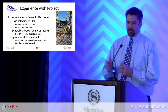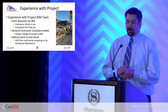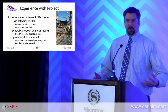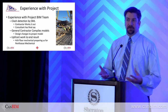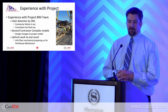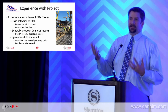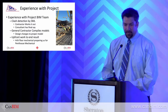And it just gets sorted out that way. The general contractor on this project is doing all the design changes. So we change our model, other trades change their model, it gets uploaded by the general contractor, they compile all the information and send it to us, and we work from that. That worked out well. There was a little bit of confusion at the beginning, but the top-down approach seems to be working. We need somebody responsible at the top levels to manage the model to make sure that everything flows more smoothly.